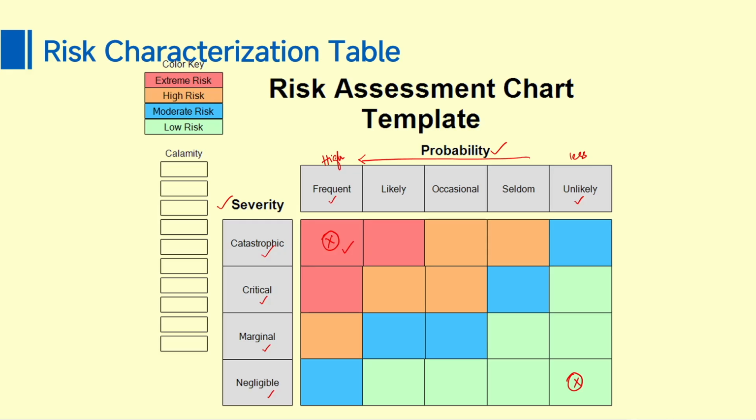Okay. So, from the figure here you can understand this 3 is going to have very important criticality, followed by the orange ones, blue and the green. So, the priority comes with respect to this stage. So, there is extreme risk, high risk, moderate and low risk. Okay. So, this is going to be the order in which the risks will be taken care of for mitigation.